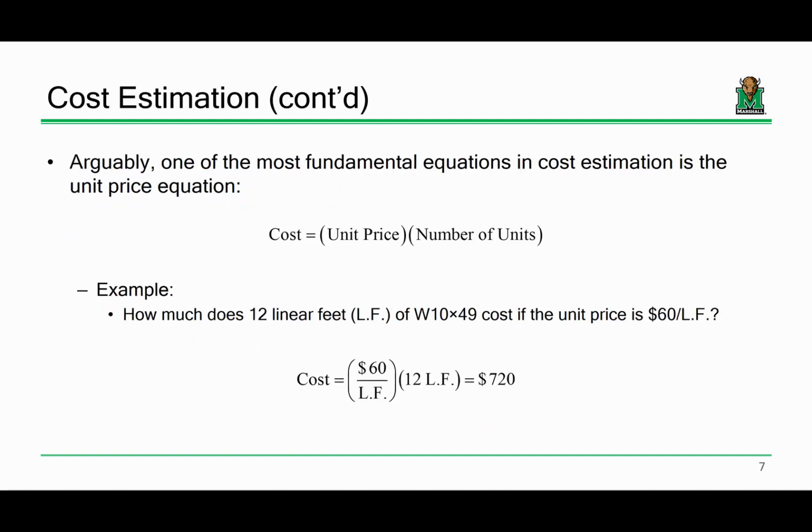Okay, don't worry. Let's take it down to cost estimation 101. The most fundamental equation in cost estimation is the unit price equation: the cost of a given unit is the unit price times the number of units.